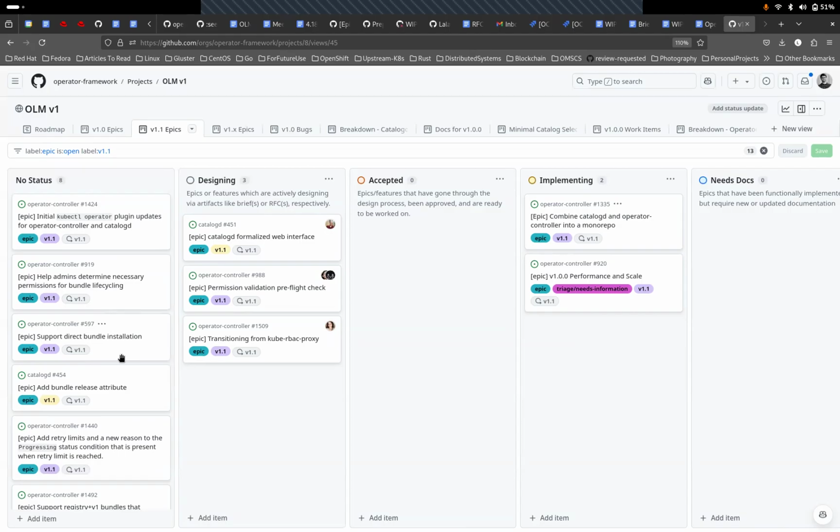So rather than waiting several months for the next release, we should think about how soon we can release any feature we add. Even if it's just one or two features, we can release 1.0, 1.1, and then move everything else to 1.2. I think as a community, we have not discussed a cadence yet. Personally, I don't know at this point what cadence will work for us. But in general, every 2 to 3 months usually works for a lot of projects. Any suggestions, any comments you guys have on this?